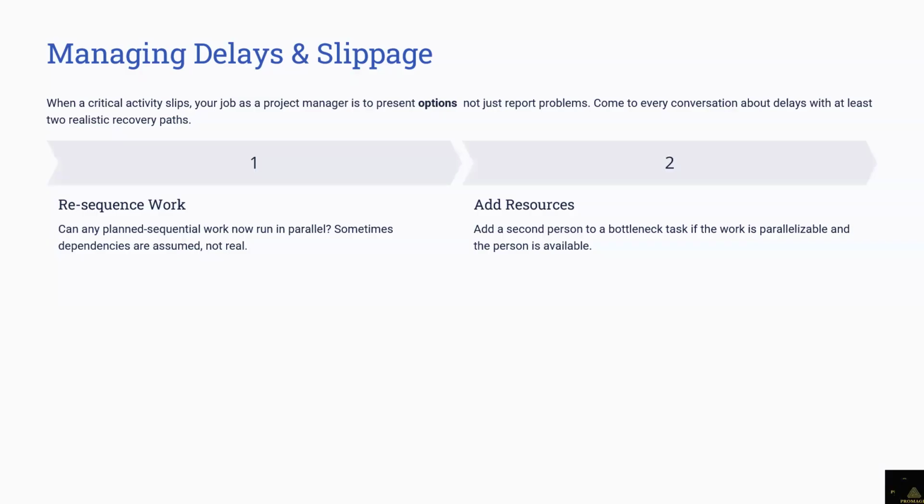And usually those MSAs could be for 5 years, it could be for 10 years. Even though there's no project, there's an agreement between my company and your company. So anytime we have work, we're going to do work for your company. This is the rate we are going to be charging. So they know the rate of everybody, they know the rate of the carpenter.